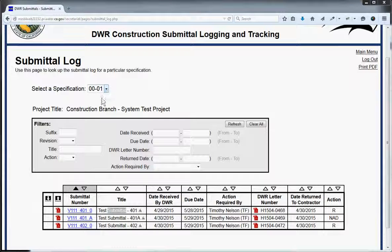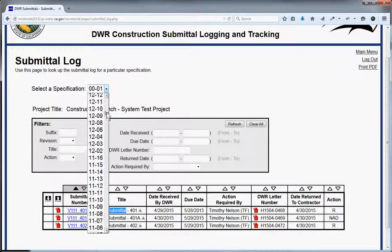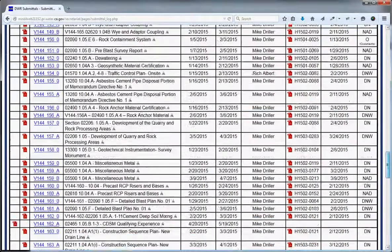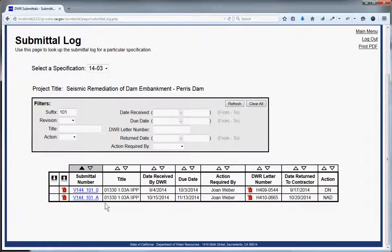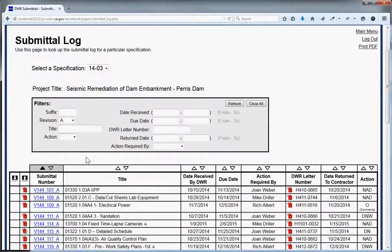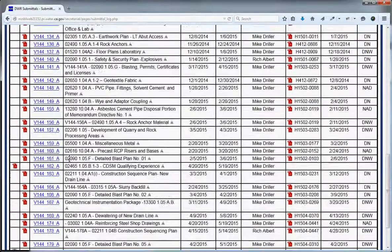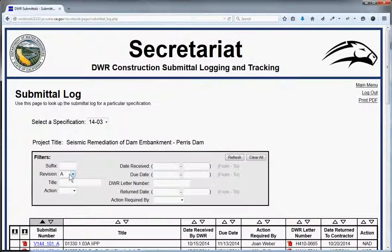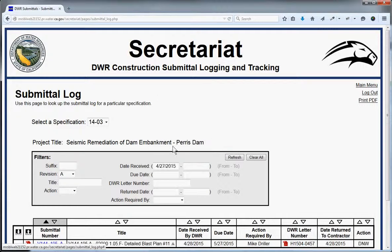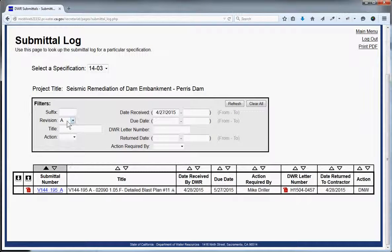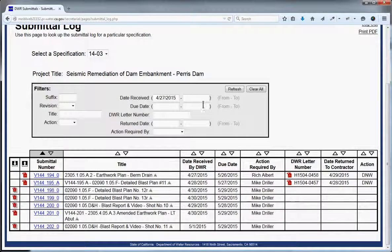On the submittal log, let me go to another log that has a lot more submittals, such as job 1403 — this log has a couple hundred submittals. There are filters up here: you can type in '101' to bring up all submittals with that suffix, or pick revision A to bring up all submittals with revision A — about 30 or 40 of them. All filters are ANDed together. Dates are useful too, so you can filter by everything that came in the past week.